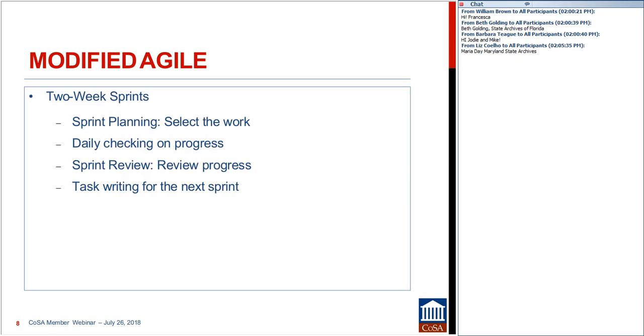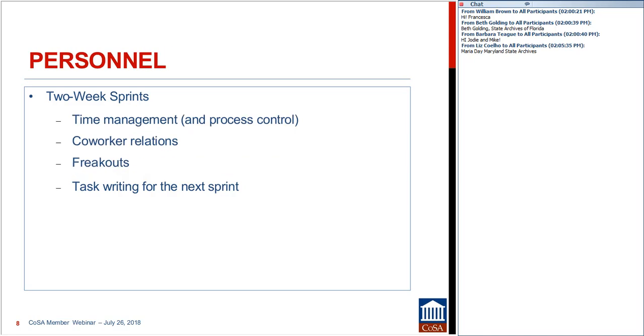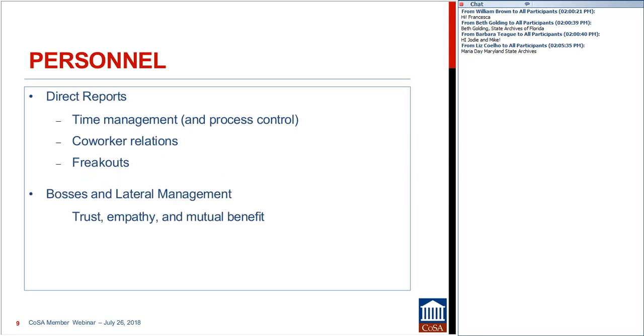And so what this means is for all of the projects that I manage, we have this every 2-week meeting in which we come together and decide really what we're going to do to move forward in the next 2 weeks, all in the service of completing all of the elements that need to be completed to achieve our milestones. So in order for this to work, we have to have a fairly good sense of how the team and the group works together.